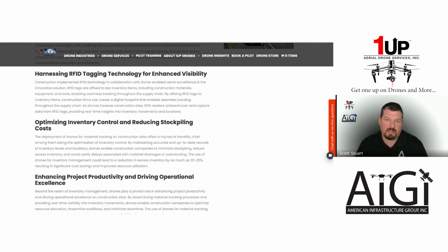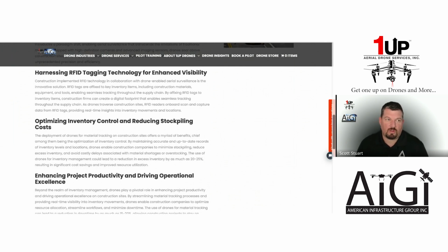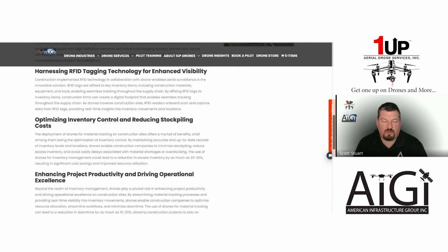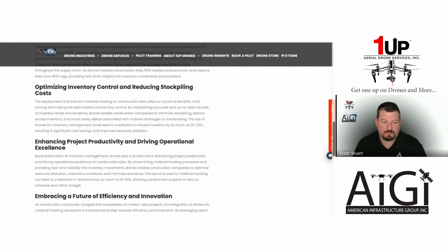Yeah, because I know with the advancement of drones and AI specifically, you can take a drone now these days and fly it over a scene and the calculations are all there. So instead of walking around and trying to count how many pipes are left or boxes or cubic square feet, using the new drone technology, it's pretty much done. It's recorded, the data sent. It's a great tool for making sure you still have the right material, enough material, just to keep projects moving forward and not slow them down due to inaccuracies on counts.